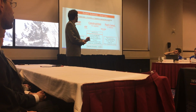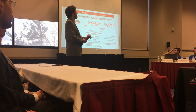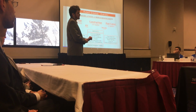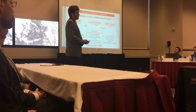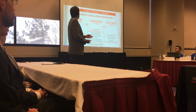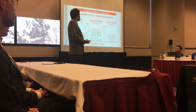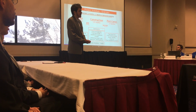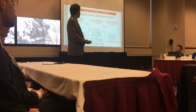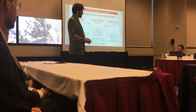Because we begin this project in December, Emeryville has a lot of heavy rain this time of year, so we've allowed a 5 week weather allowance to avoid any sort of project discrepancies. Also, after we get substantial completion, we begin the 2-month post-construction process. That includes our final punch lists, final commissioning, owner training, and finally closeout in time for our final completion date of February 2018.